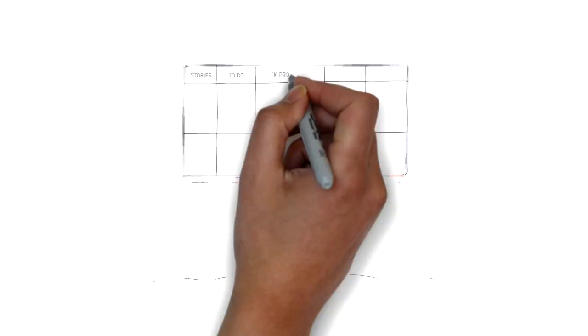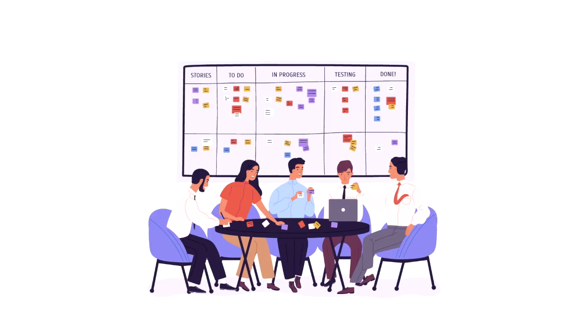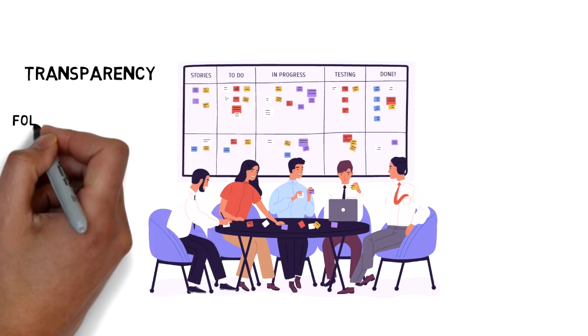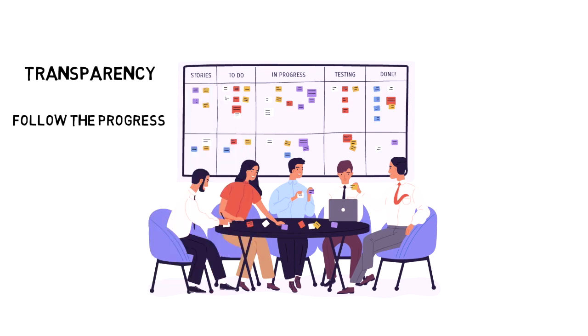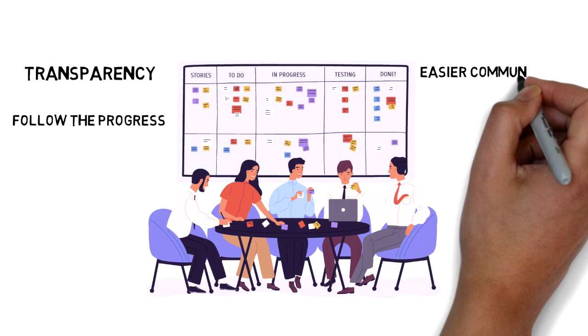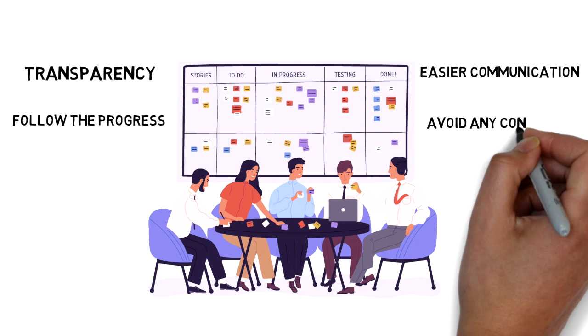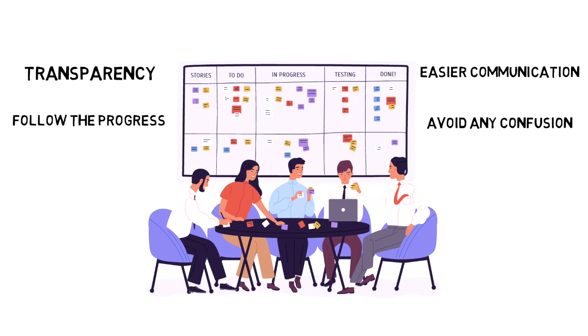The transparency allows the other teams to follow the progress of the work of this team, make updating and communication easier, and it also allows the team itself to avoid being in a situation of confusion. For example, a developer will not take a ticket already processed by another team member.